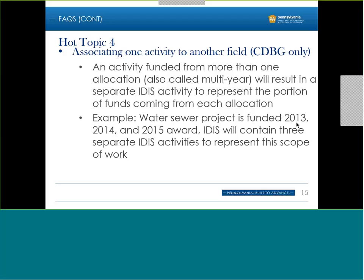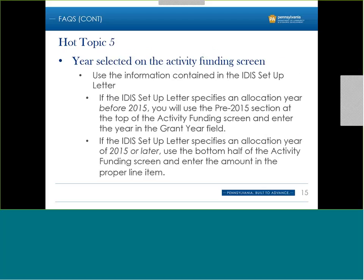One extra note: if you're charging program delivery costs, make sure you associate those costs with the proper allocation year, especially when you have three different activities. You want to keep those budgets aligned with the allocation from which they're supposed to come.